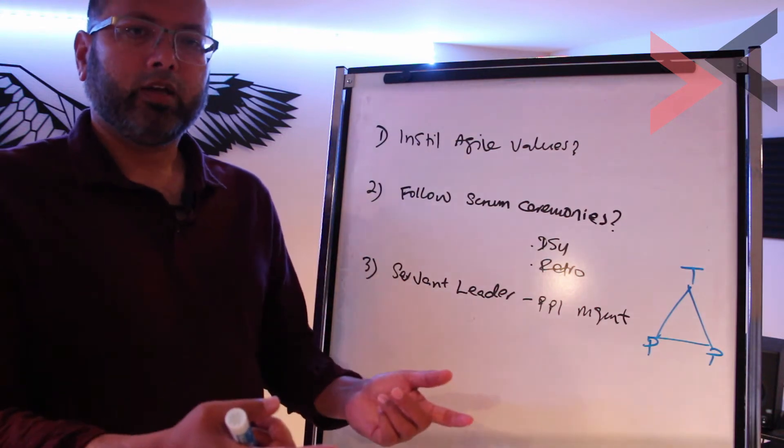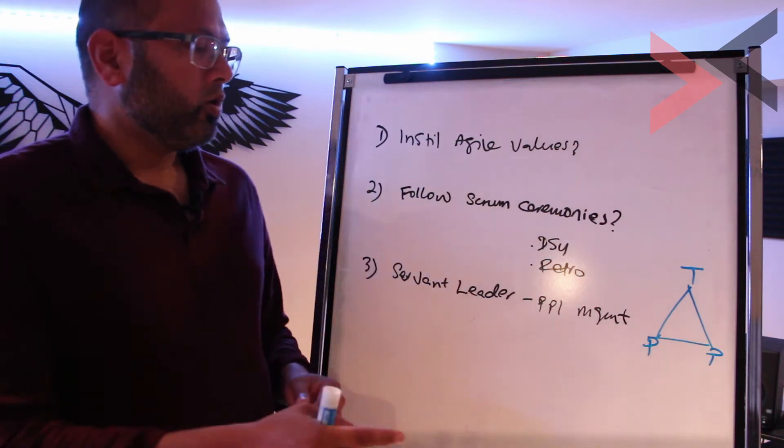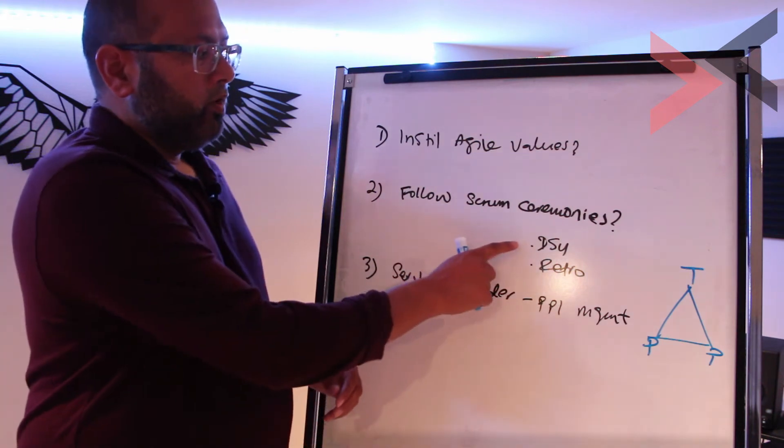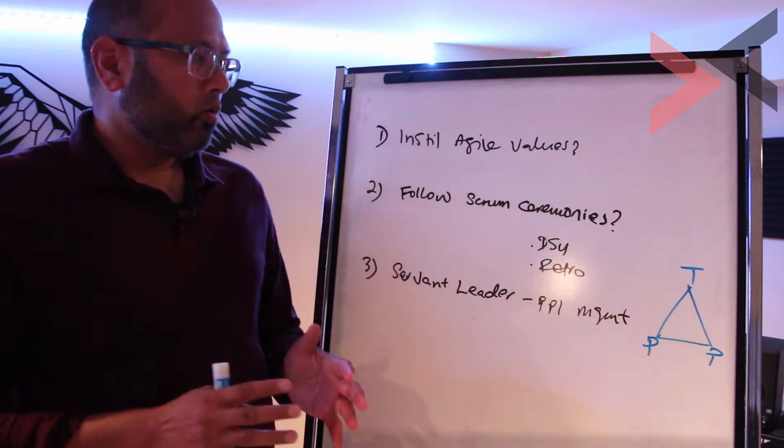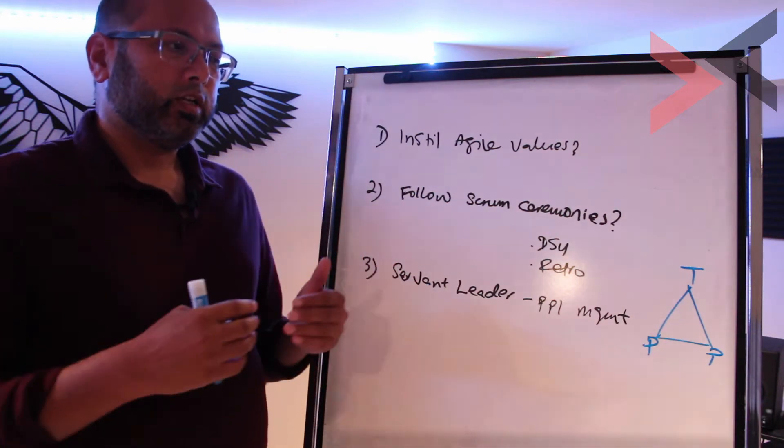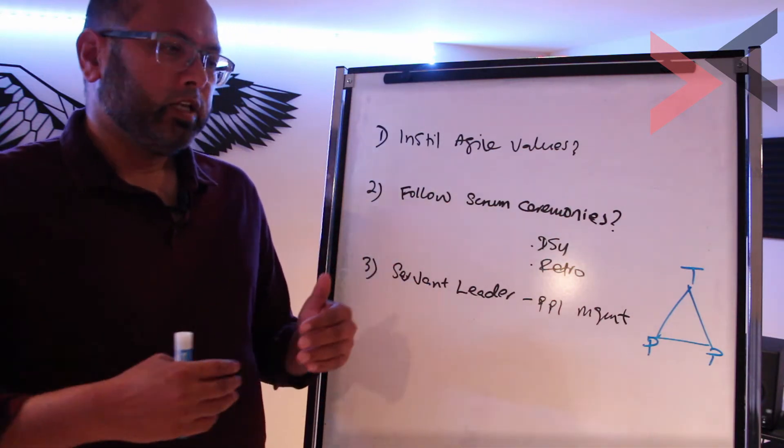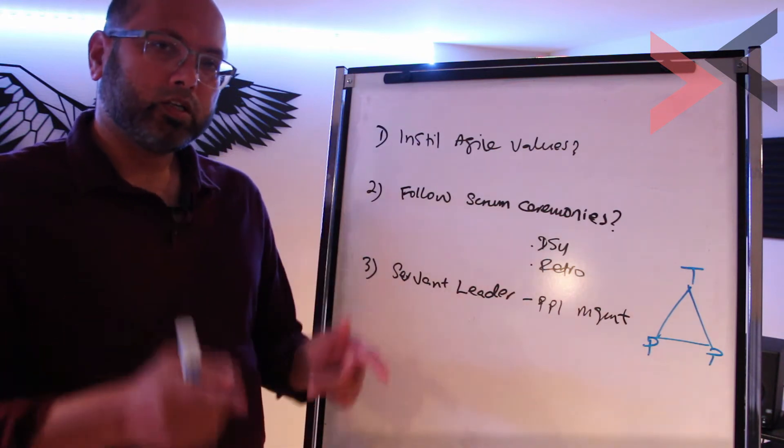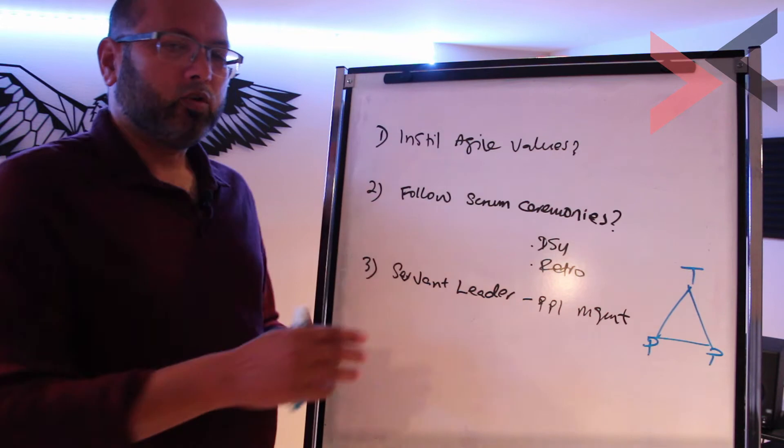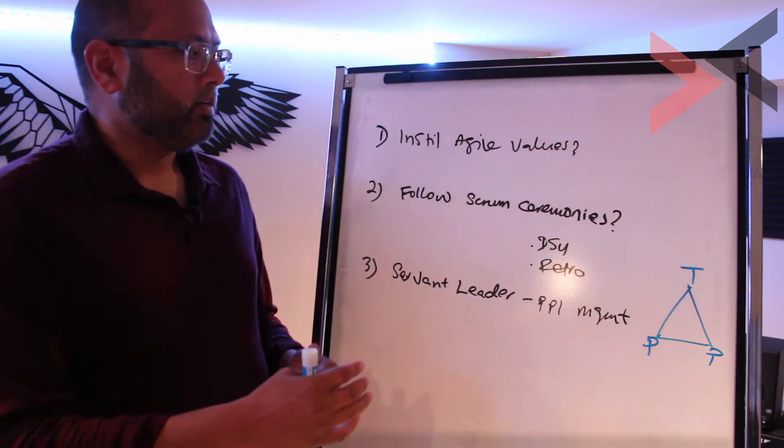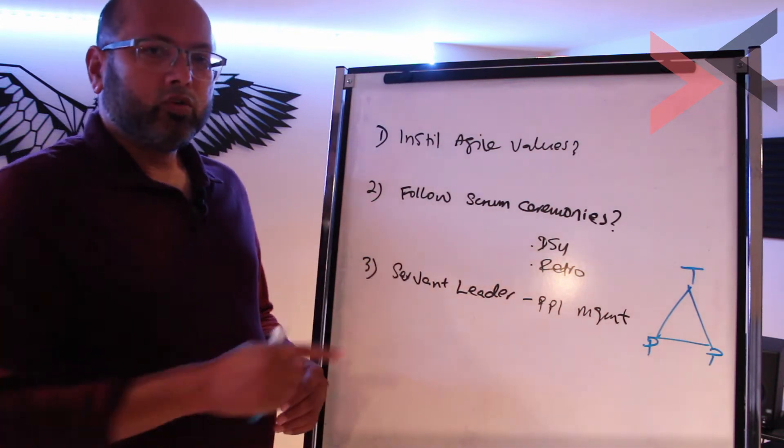So let's talk about the daily standup: 15 minutes, a touch point for whom? For Scrum Master to see how they're doing? It's not true. You don't give updates to Scrum Master. It is for the team to have a touch point early in the morning to understand how they're doing in terms of progressing the sprint that they're taking on, in terms of completing the work. It is a touch point for the team to understand. The Scrum Master has only facilitated that.